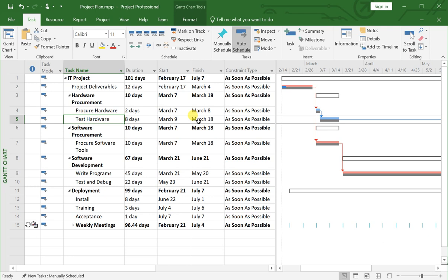So here you need to set task dates to specific dates. Sometimes tasks need to occur on specific dates or follow other date constraints. Like here in this example, you should purchase hardware right before the install activity starts. So date constraints are one way to specify when tasks start or finish with varying degrees of flexibility. Every task comes with some type of date constraint.